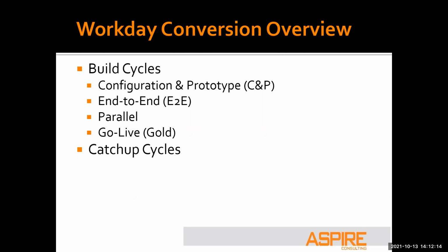In an environment where you have a production PeopleSoft system, you can't always shut off your users' interaction with that environment 2 months ahead of go live for Workday, right? You may go into a freeze period a month before, where you're trying to really limit the number of transactions in your legacy system before go live.